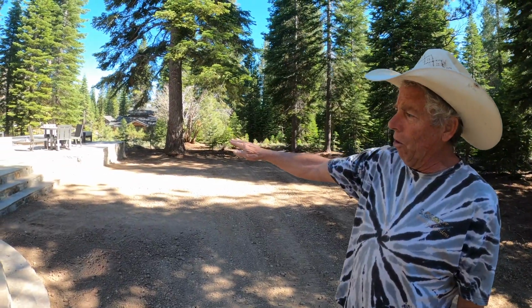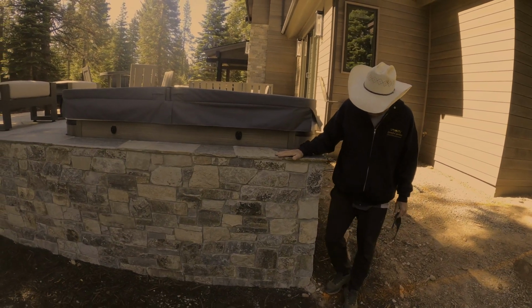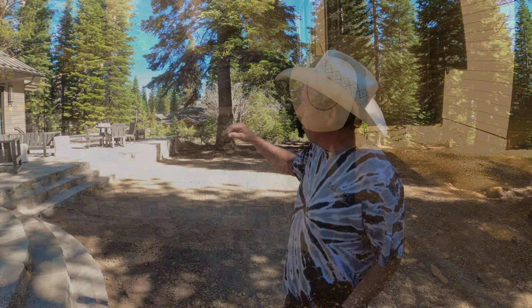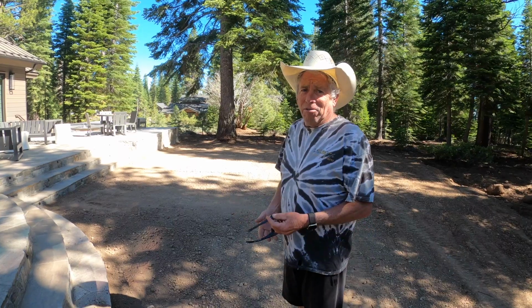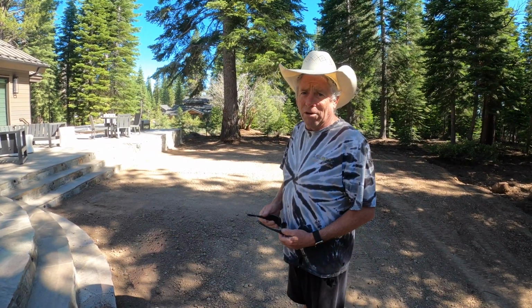Now this patio that basically needed a railing before we showed up because it was over its 30-inch height, now is well under 30 inch. No reason to put a railing around that anymore for the fall hazard legality side of the permits. You know, final approval, you have to have all that stuff signed off.